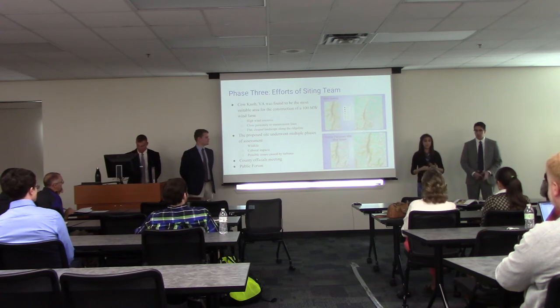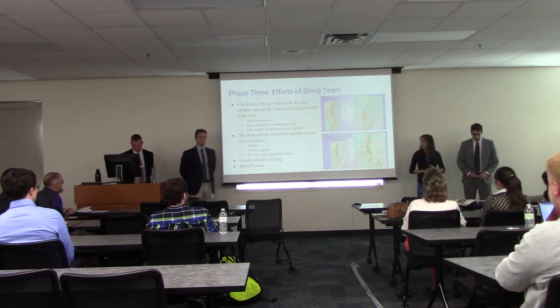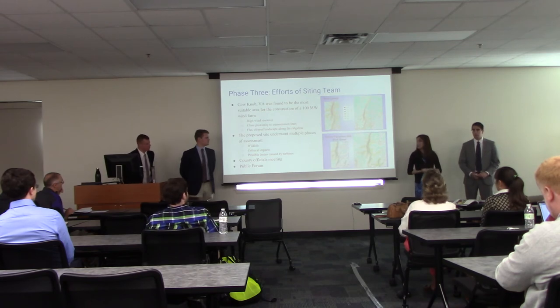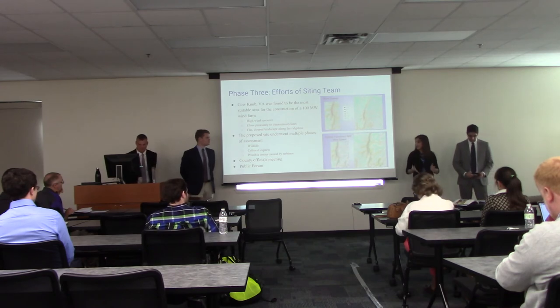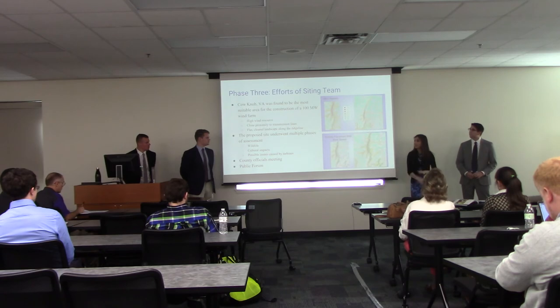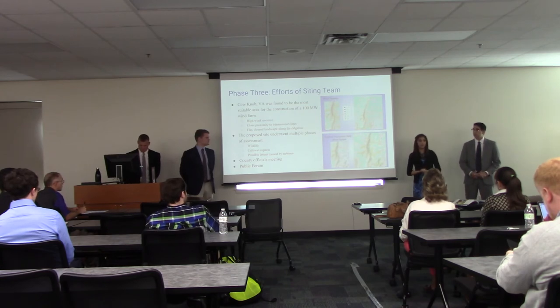Another factor for Cow Knob that really made it a viable option was something that was really important to the siting team, the DOE, and the residents of the area, that there's minimal wildlife and cultural impacts. The siting team was responsible for conducting outreach to talk to the community about how they would feel about a 100 megawatt wind farm in their area. And they held a county officials meeting where they presented their idea, as well as a public forum, both of which returned really, really positive reviews for this hypothetical 100 megawatt farm.